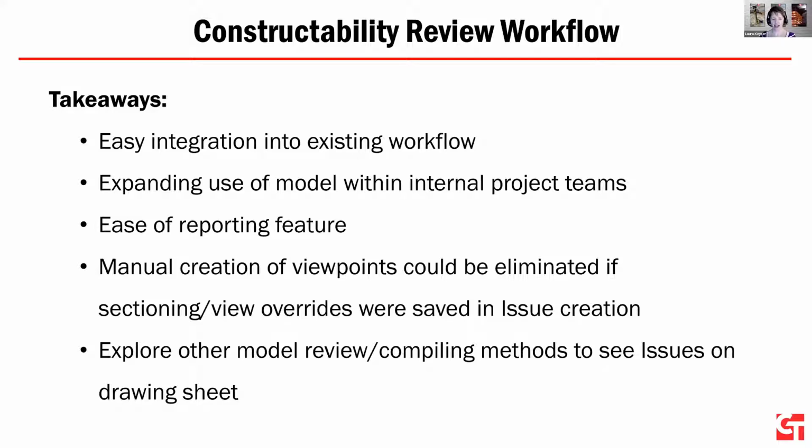And because I had exported NWCs from Revit models and made an NWD, then the issues weren't linked to any sheets because the sheets don't exist in that NWD file. So that was something else I wanted to think about in the future, was how could I possibly do this so that we can still get the issues in the model, but then also on a sheet, which would be even more critical if we're talking about more issues than just the limited number that we were going through here. But all in all, it was a really good experience.